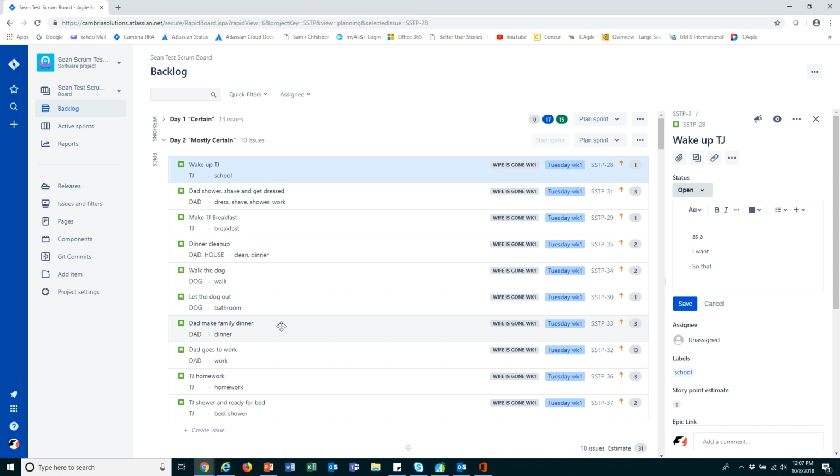Now, very early on in a team, before the team matures, they don't have an established velocity. All right, velocity is the number of stories that the team completed within their sprint. They will oftentimes overcommit and underdeliver, and they're not doing anything intentional there. They're generally being a little over optimistic.